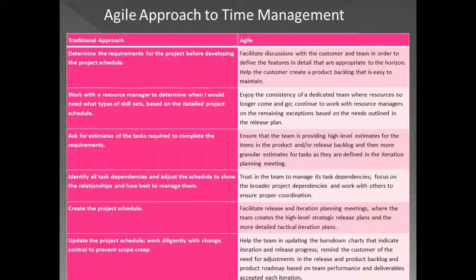But of course, if we don't complete the desired features in the respective iteration, then consequently the release product backlog, product roadmap and deliverables need to be updated. This is the way we do schedule control, and if additional iterations are needed, then we add those additional iterations as a part of the updated release planning.